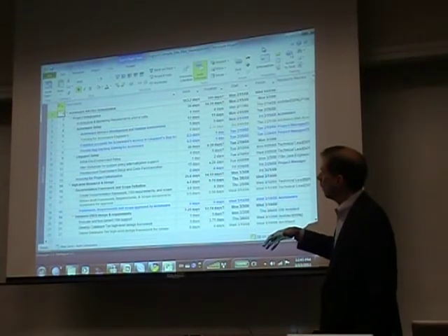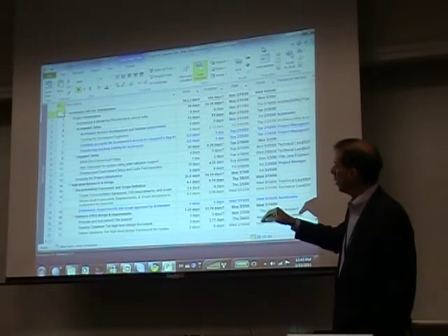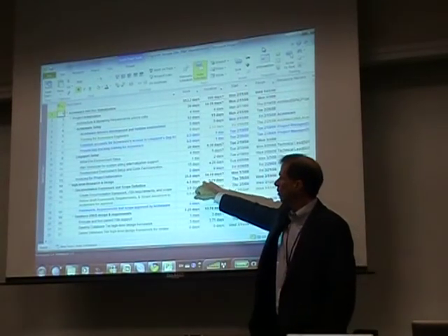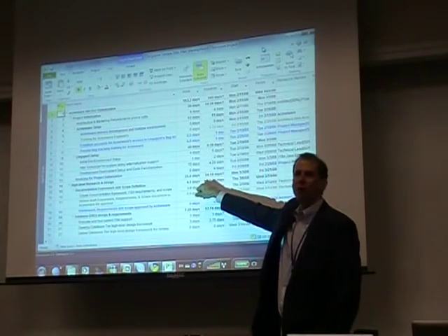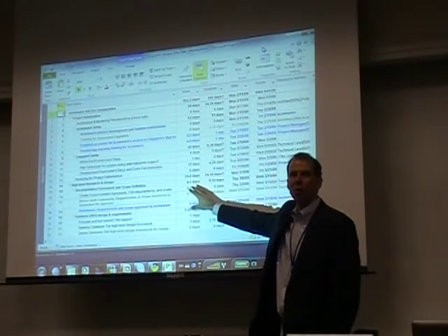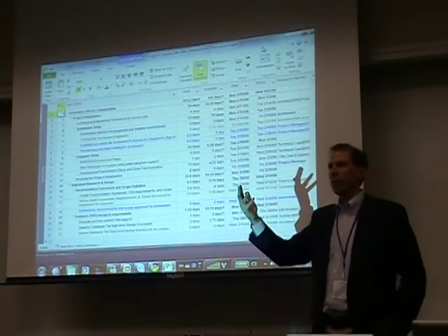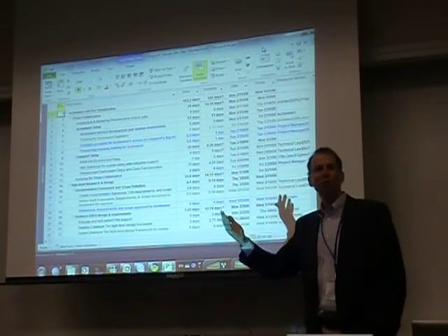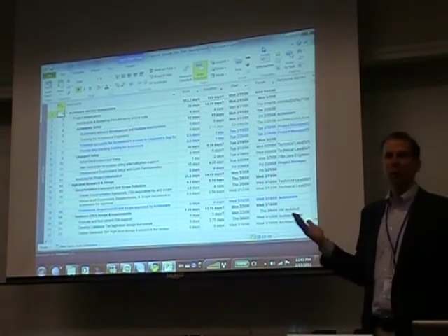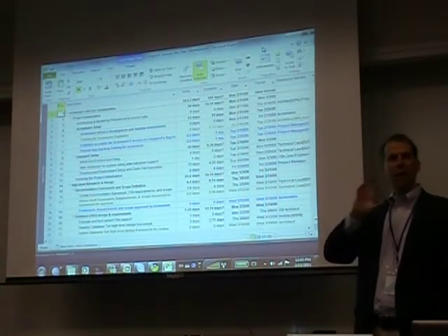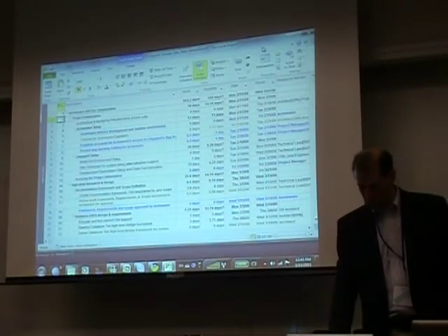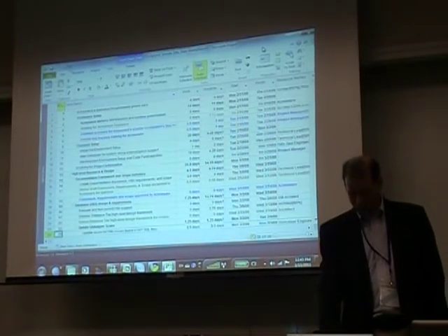Then there'll be what we call research and design. That'll go on during the initial project, not just up front, but during the whole project. You don't necessarily have to get everything designed up front. You have to get certain critical issues like your locale framework designed up front, but there may be esoteric parts that you can move through.